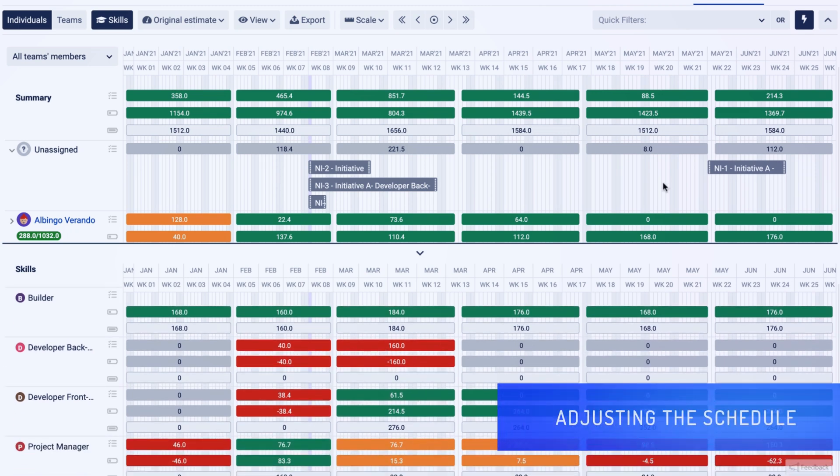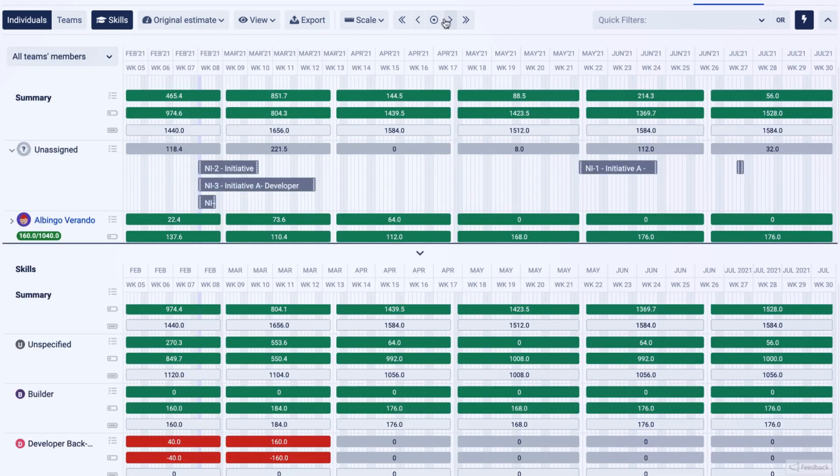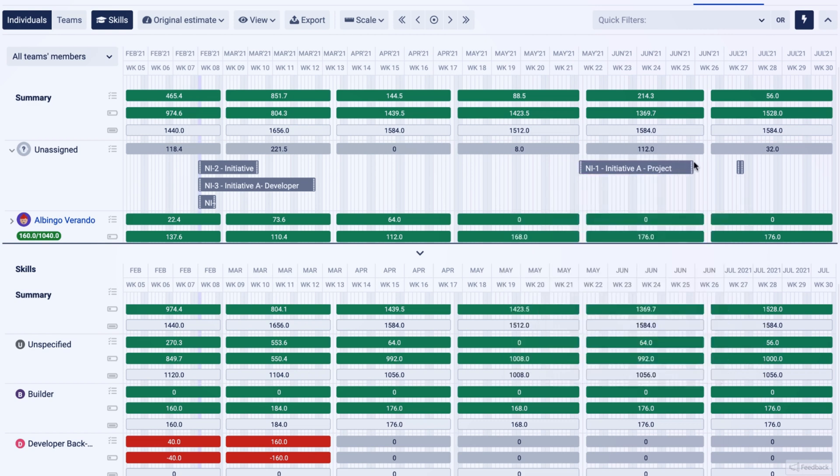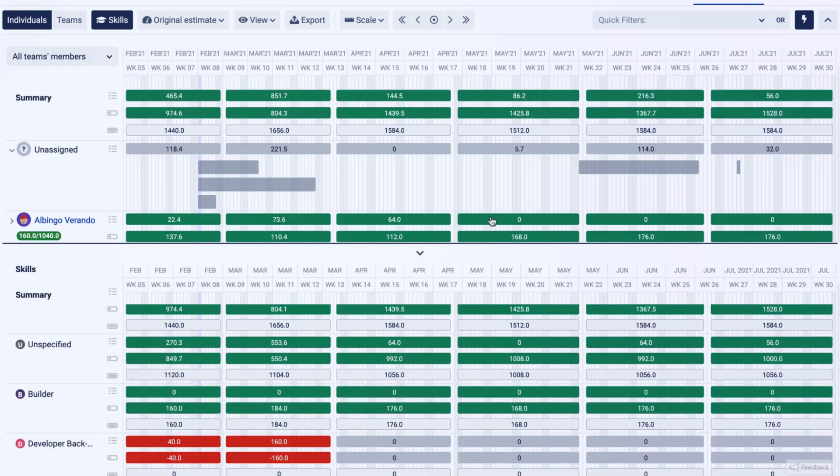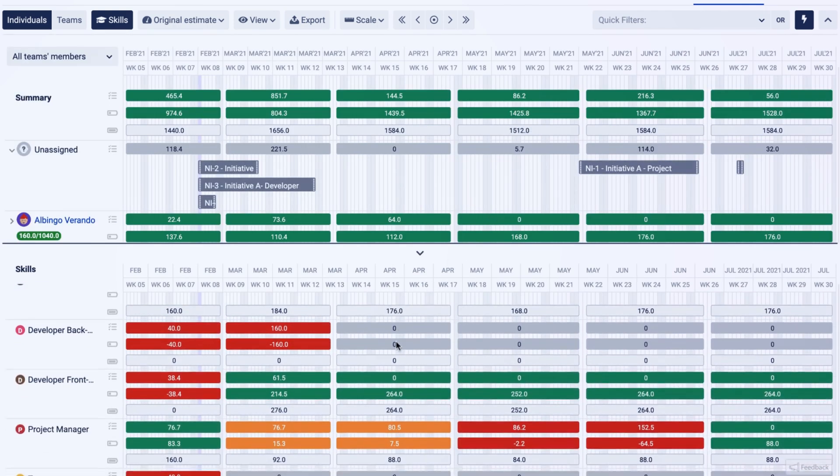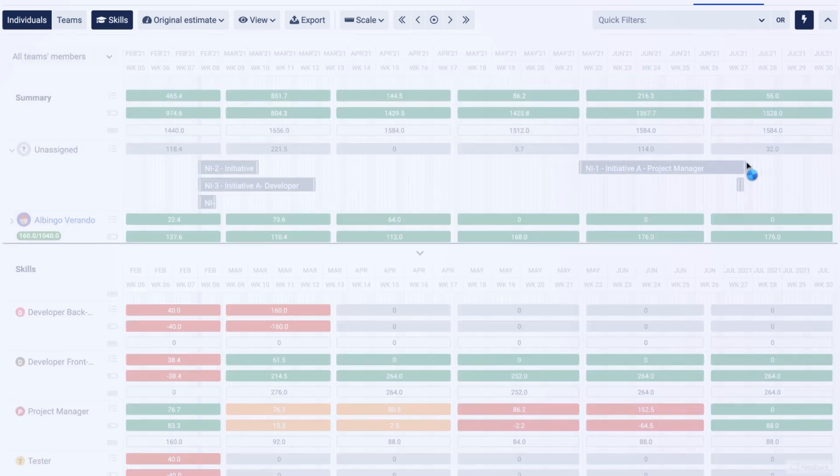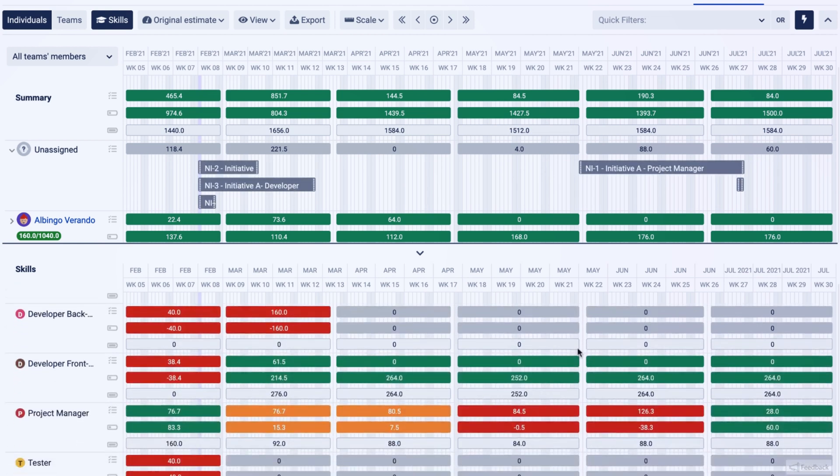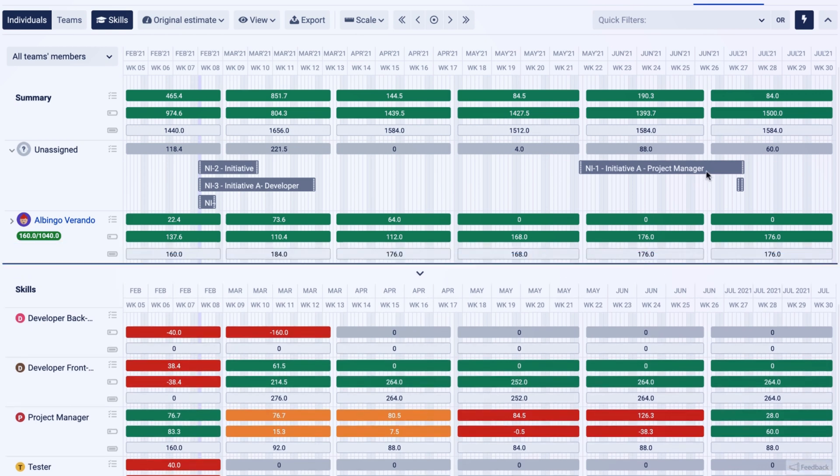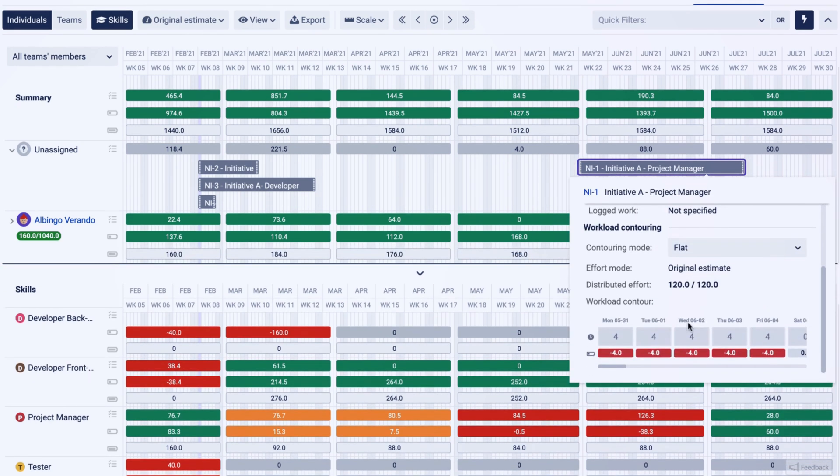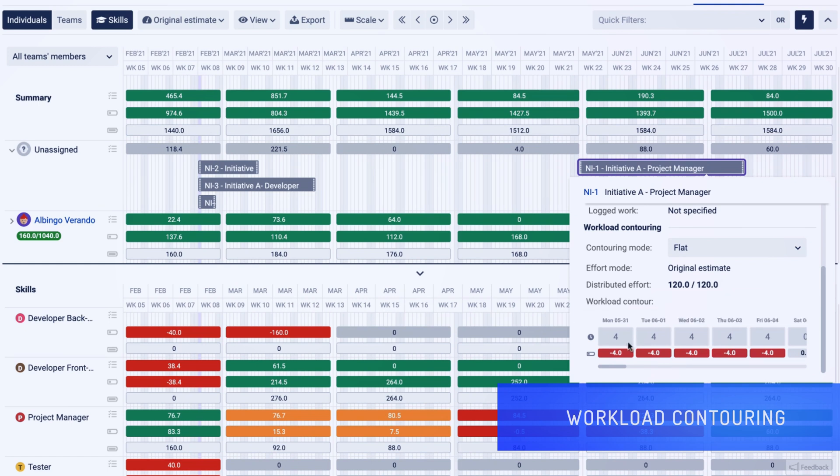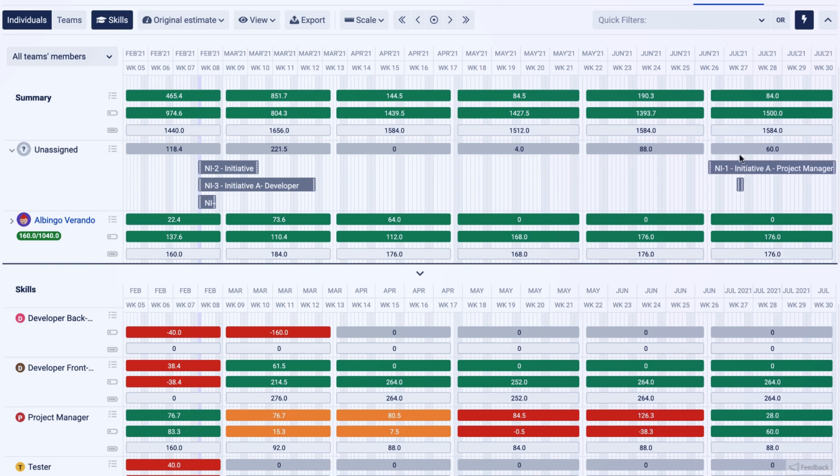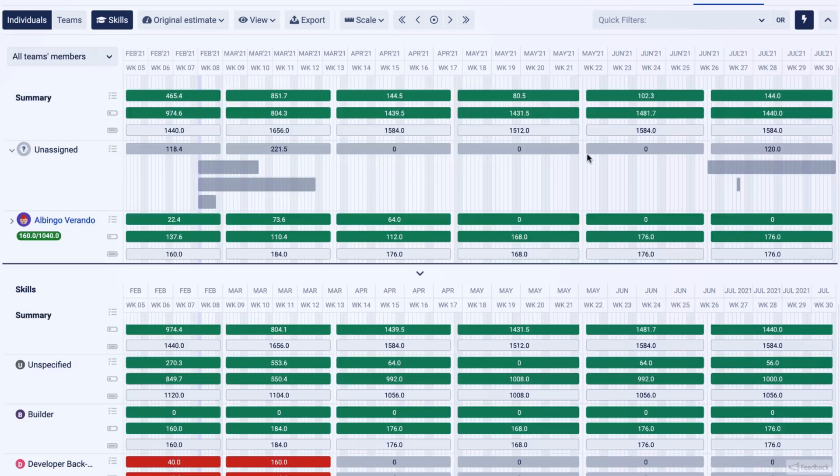Now let me adjust this view one more time. I still see that Angela, she's a bit over-allocated. That's probably because my task is three weeks, so I should stretch it a bit more. Of course, she might have additional tasks as well. We're still lacking 64 hours. Now we can try to make further adjustments. I can click here on this task and see how the workload is distributed. It's four hours a day, which seems to be still insufficient. So I might need to move it to the start of the next week.